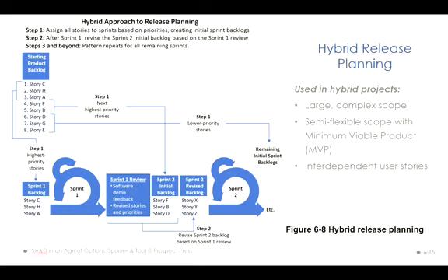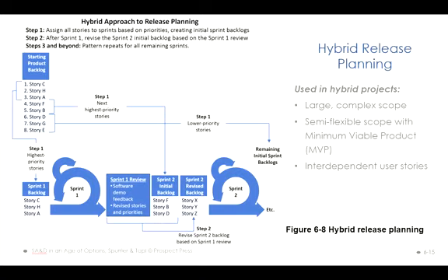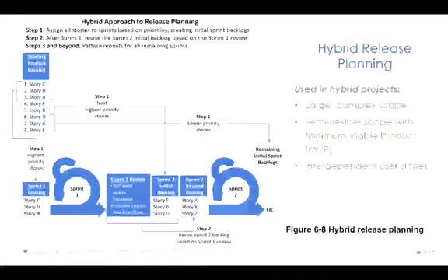On the other hand, in some larger projects, when we encounter this hybrid release planning, you have something different. As you can probably see, the process is very similar. You plan in sprint cycles, but the way you prioritize the backlog is different. The difference between this hybrid method and the previous Agile method in terms of backlog planning is that in the hybrid approach, the backlog is dominated by the big front-end requirements you already set up.